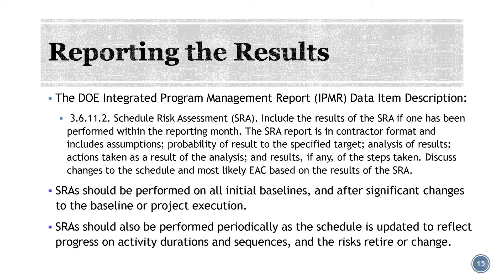The SRA is often used as a probability test of the critical path schedule's forecasted finish date, plus finish dates of critical interim milestones. These date forecasts and the nature of the critical path often change during the course of a project schedule. Periodically running an SRA analysis can keep the project team continually aware of the shifting risks to schedule during the life of the project.